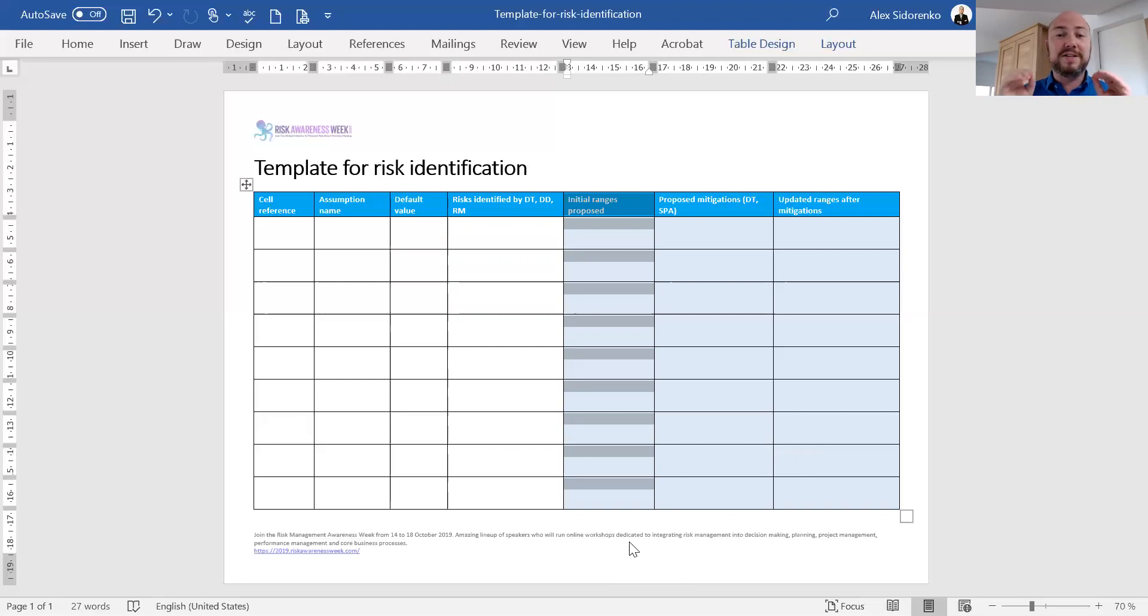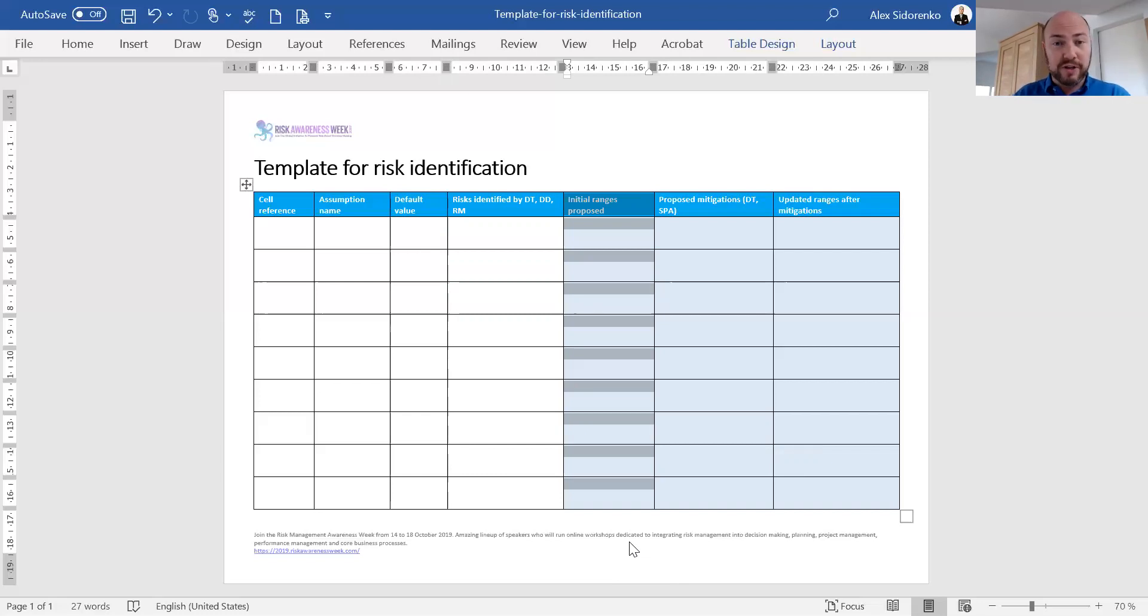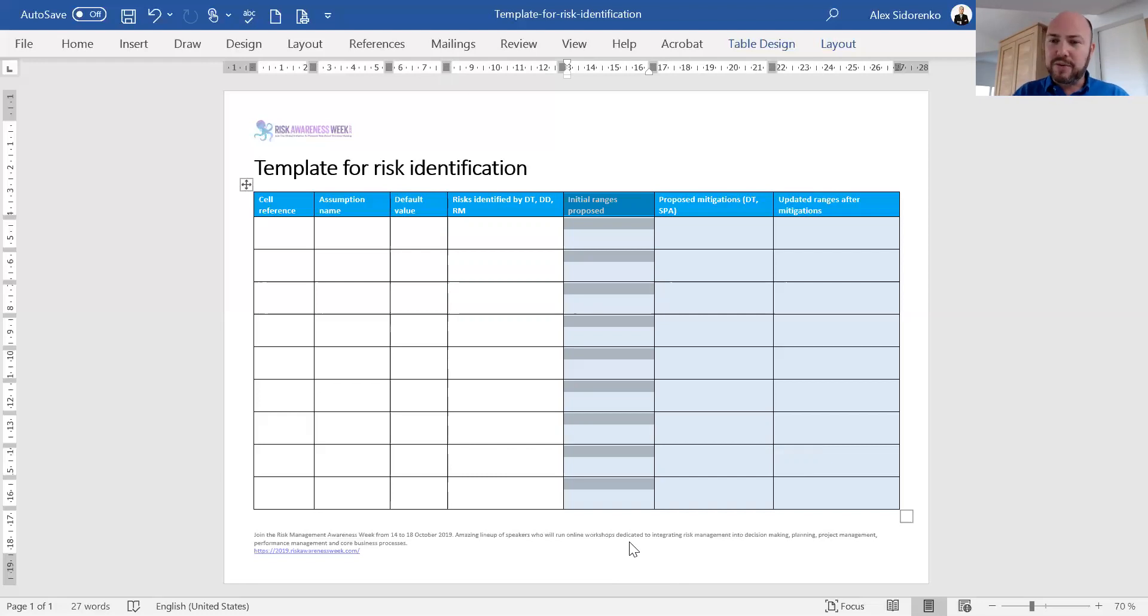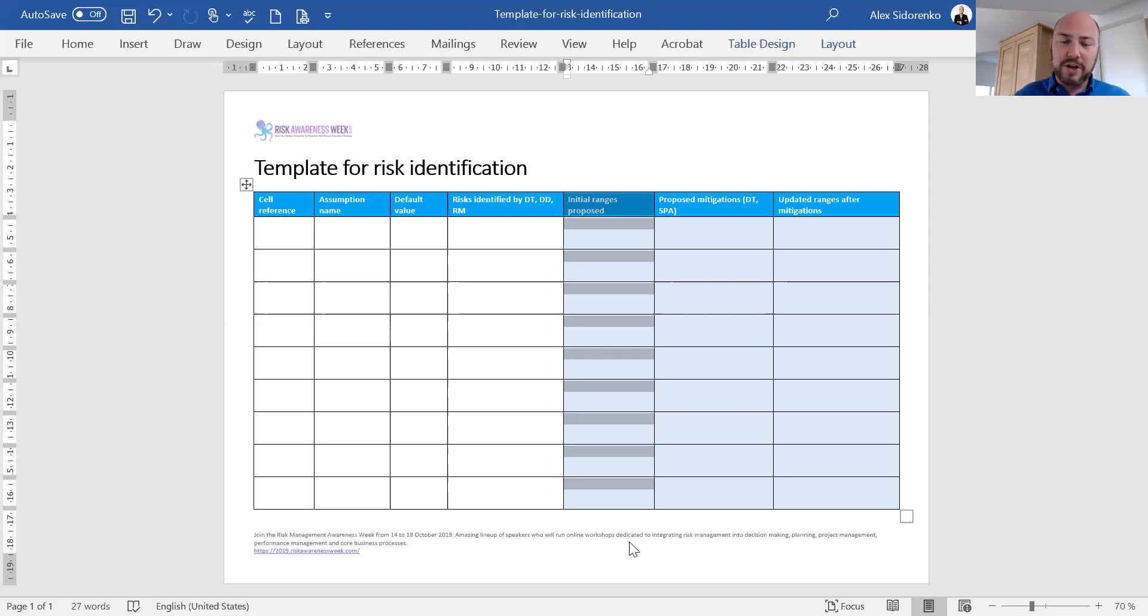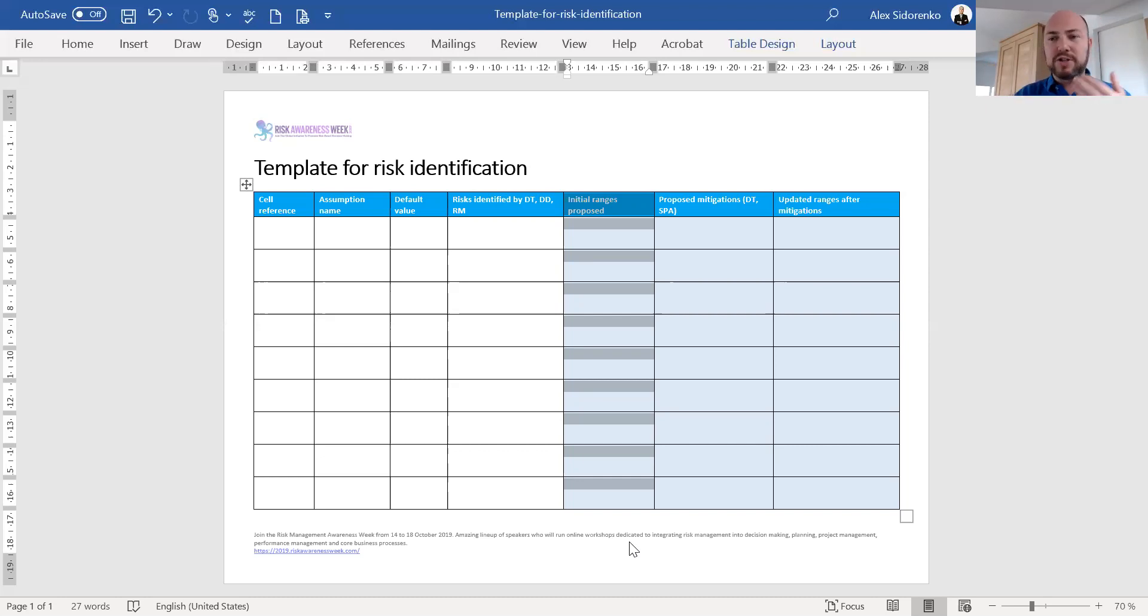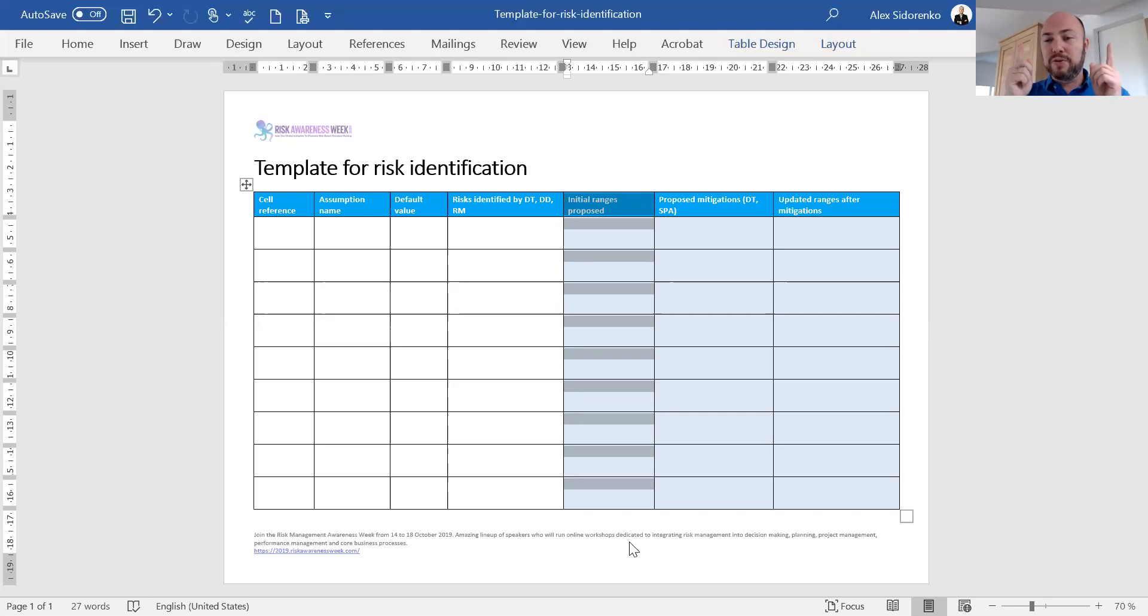This is groundbreaking stuff for most risk managers, because traditionally risk managers look at each risk individually without linking it to any assumption whatsoever. Then they rank each risk in terms of likelihood and consequence. Not only is this mathematically stupid to do, it's actually not really helpful, because you have to link the whole risk analysis information back to the assumptions, back to the decision. The whole reason why we do risk analysis is to inform our decision making. Here we use the risk information to propose an initial range for each of the assumptions.